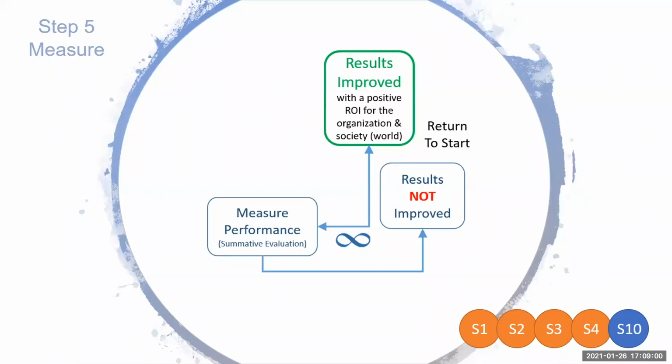We did a costing, and the cost part is a little different because it was a military organization. Normally employee salaries don't get figured into things, but we did the tough homework to figure out what all those costs would be, including facility costs and the computers and the software and everything.